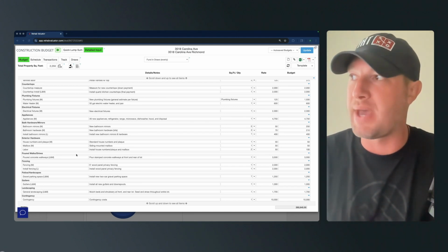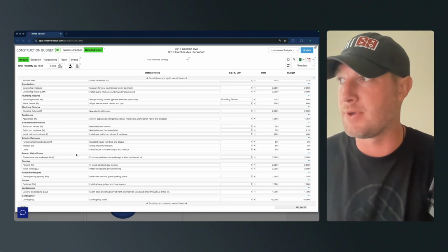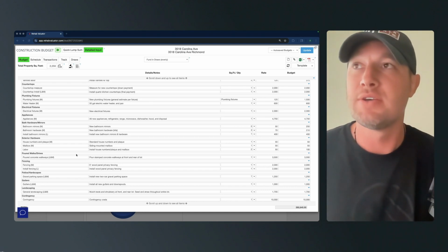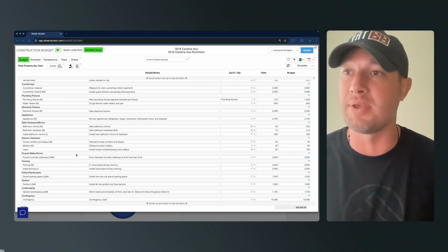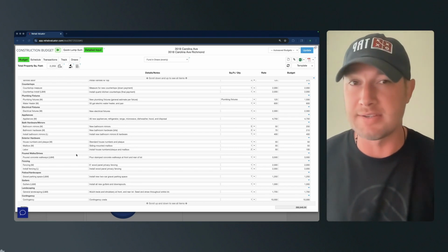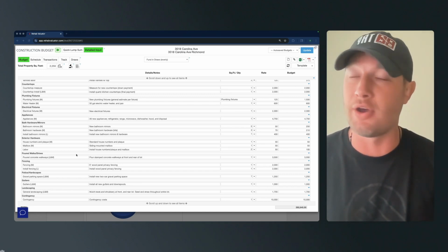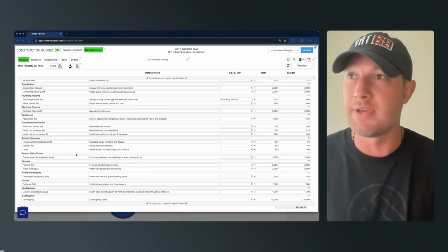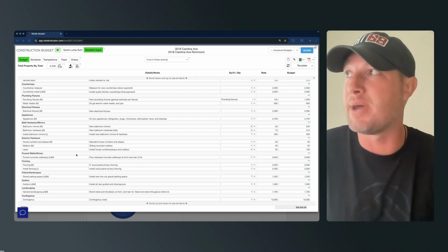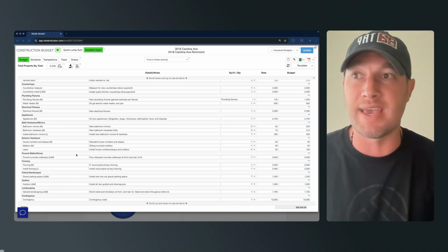So this includes patios, poured walks, fencing, landscaping. Okay. And then you'll see at the bottom, I even have a contingency number of $10,000. So I actually think this is an incredibly conservative budget. I really think I'm going to be more like 280,000 on this build. So talking mindset again, I'm always trying to overestimate. I'm always trying to be conservative. So if you see any of these numbers that seem high, that's really going to be the reason why. There might even be some numbers in here that look a little bit low, but for the most part, this is a really good budget.